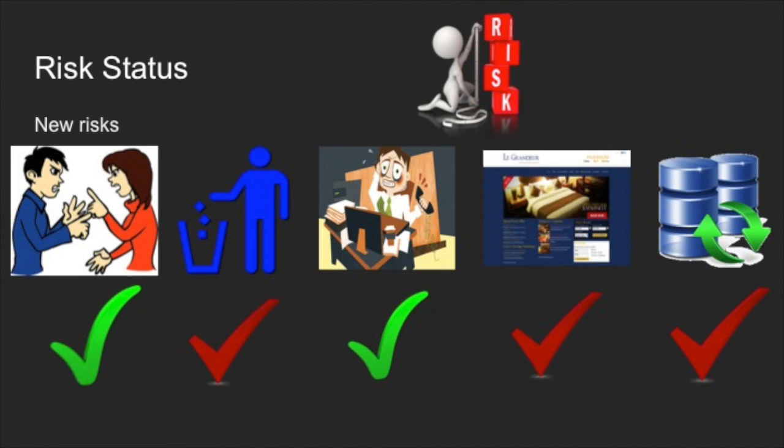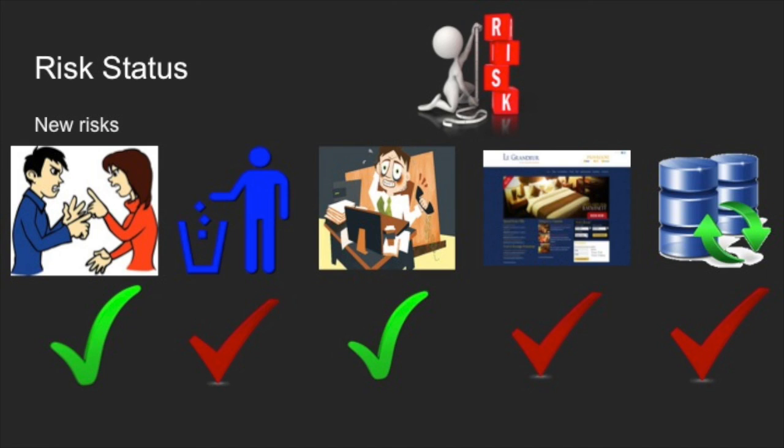Some of the new risks that we've managed to see in the project are conflict risk, or severe personal conflict between group members that we've been able to check, and the overwork risk, which is trying to implement too many features and not being able to finish in time.